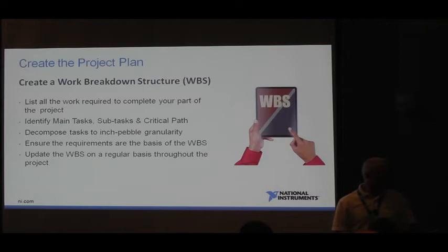A little more details about the work breakdown structure, the WBS. You want to start at the high level, some of those interim milestones that I talked about, and then break it down into smaller chunks. Go from a boulder to a rock to a pebble, and get really detailed. Okay, you're going to create the software, and so you'll come up with an architecture plan, a software requirements document, maybe a software test plan. You'll actually write up your code, and then do testing on that code.